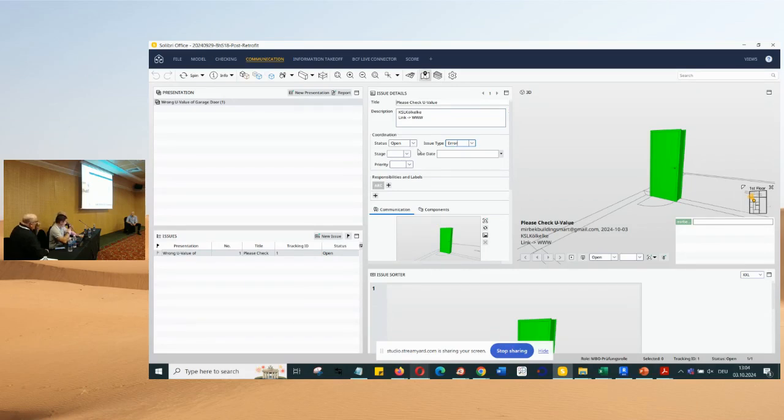So you can simply track, if you have some tool like a facility management tool, asset management tool, maybe even change management tools. You can directly check if my contractor, the engineers, did their job properly. If it's still open, I can track that information. I think it's the most important aspect here. And we share the certificates.